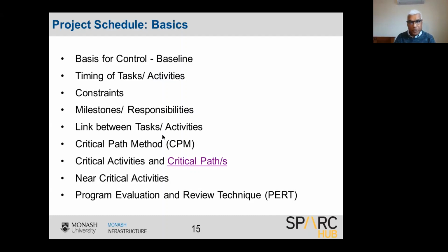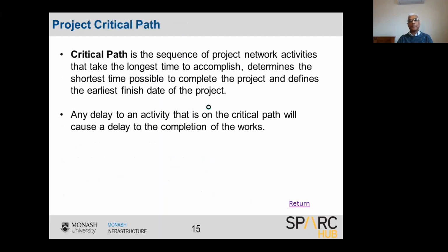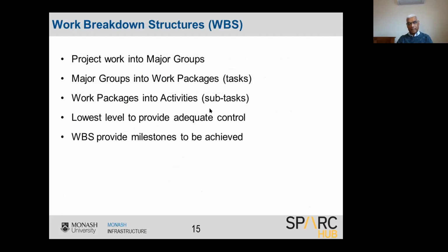As you can appreciate, I can't explain everything in detail, so I'm just going to touch on the important aspects. The next important aspect is the work breakdown structure. When you look at the schedule, you divide the work into major groups, major groups into work packages, and work packages into activities. It's a sort of cascade, or sometimes you call it a tree diagram. So you group them on a work breakdown structure basis.